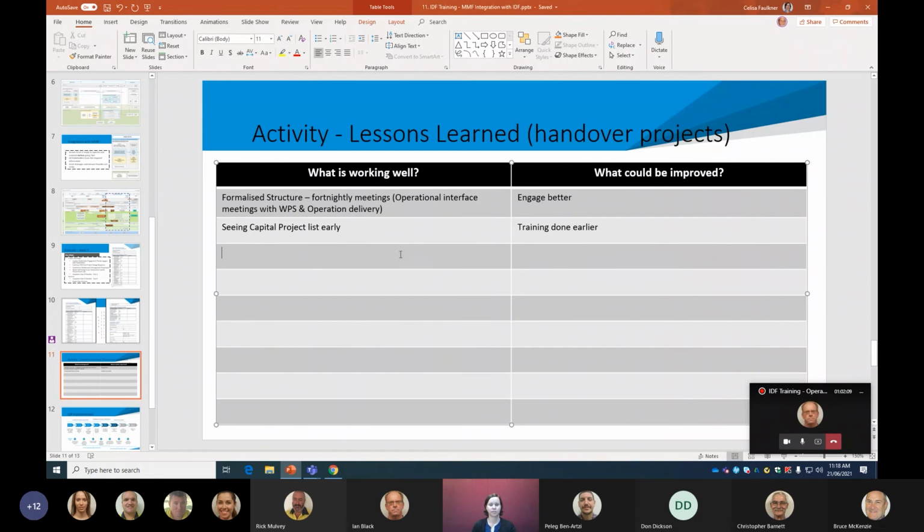I think what could be improved, and it's somewhat been happening with the outworking that's been done around the MMF, is understanding what the inputs we need for that. So in our project space, again, coming back to biosolids, where we have to develop a bespoke asset management plan for that item, we didn't really know what format that had to be in or what detail, but we could actually spec that in the contract and get what we needed at the end of the day.